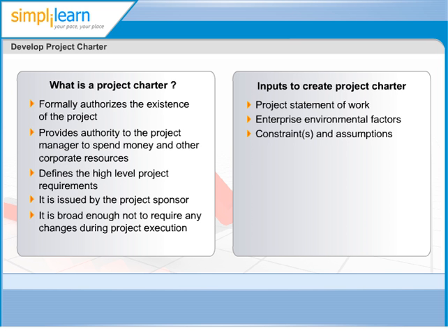Assumptions are things that are assumed to be true, which may work out to be actually true or may in turn be false as well. For example, it may be assumed that a project would not require purchasing any third-party component, but while the project is being executed, there can be an actual need to buy a third-party component. This is an example of assumption, which may work out to be wrong.